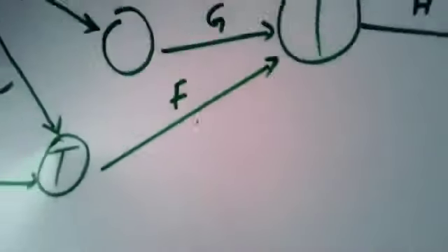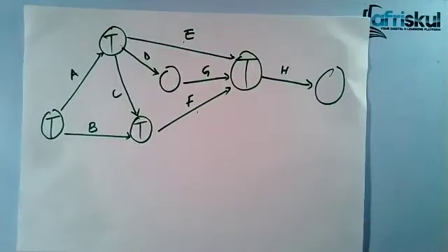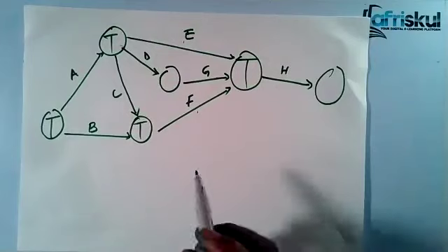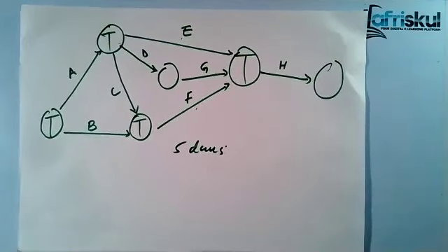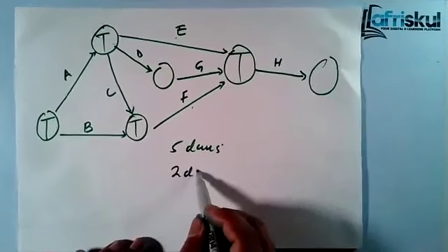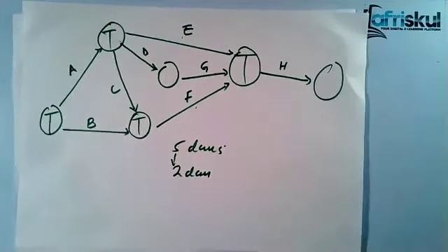Now, crashing, what do you think we mean by crashing? When you're saying now, like for now, we are doing the crashing program. So what are we doing? Now, crashing, in another term, just means taking the minimum time possible. Now, assuming you are given a task that you are supposed to complete within 5 days. But then you are told that you need to complete it within 2 days. You see, you are reducing from 5 to 2. Now, that's what you call crashing.